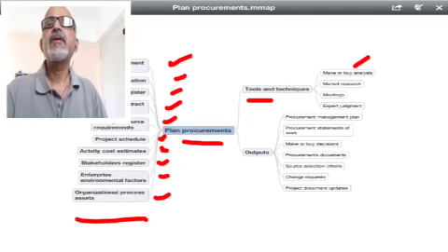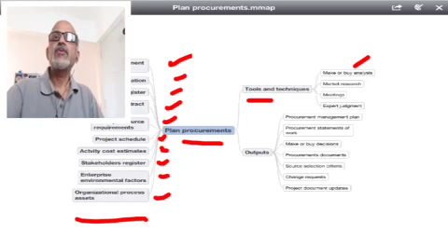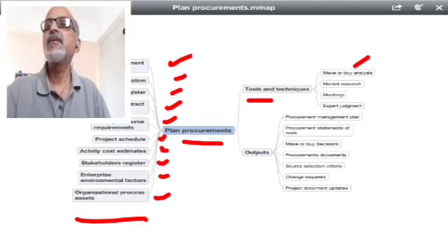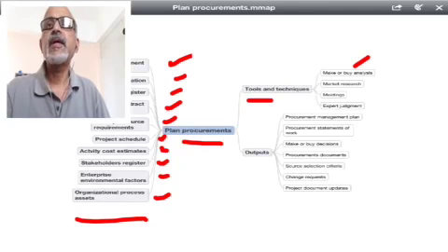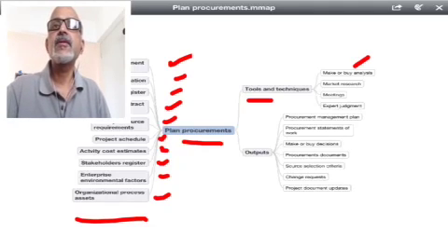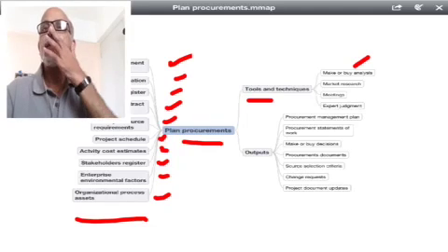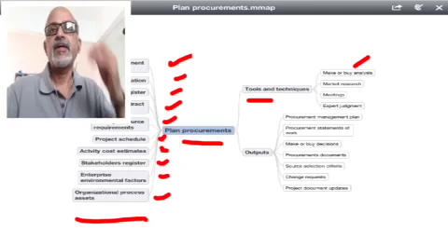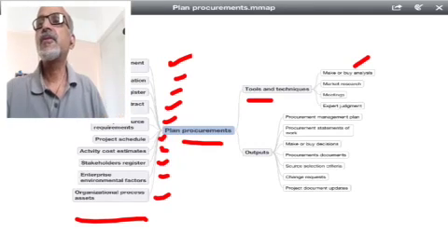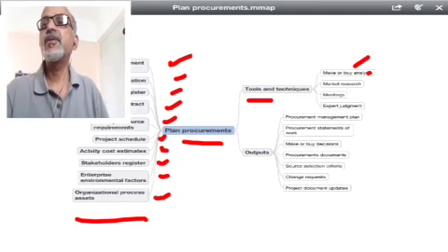Maybe a riskier piece where we don't have the expertise, we would love to outsource to somebody. Sometimes buying from an external resource or importing something from some other country would be cheaper than procuring it locally, or making it by yourself. So this make or buy analysis happens during procurement planning.